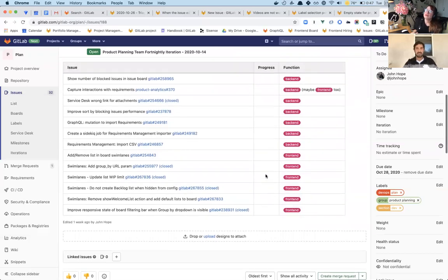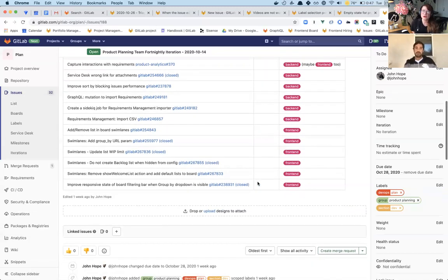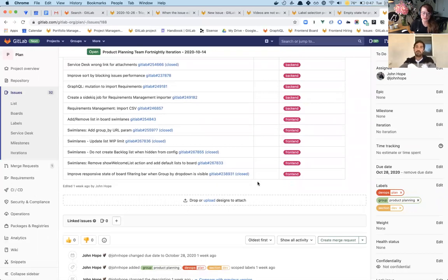Wouldn't that be 3 iterations? Can you repeat? Yeah. So you remember how we used to, and we kind of still do, work off of themes. So I want us in an iteration to have 3 themes, which is essentially going to be just 3 different issues. So each front-end engineer will work on a different issue, and it'll be something that they can complete in an iteration, in 2 weeks. Okay, right.